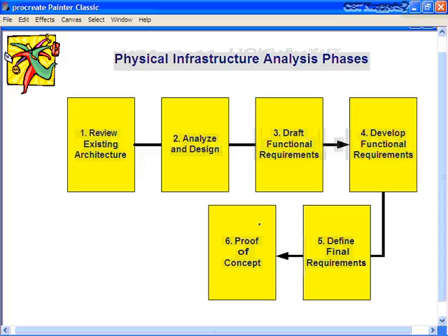Proof of concept is highly recommended. This is used to prove that the chosen hardware solution and software solution meets all the requirements, security expectations, and growth expectations. The deliverable should be a running prototype with associated documentation and technical specifications.